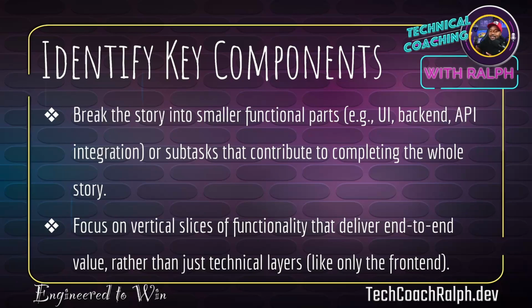The API connects to the database, so we can break the stories into smaller pieces. You can have a story for setting up the database, and then one for creating the database schema, creating some methods, some endpoints for being able to create an entry, retrieve a list of all the entries, retrieve one particular entry and so forth.